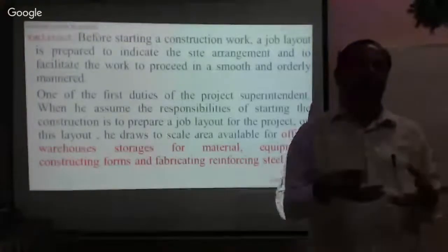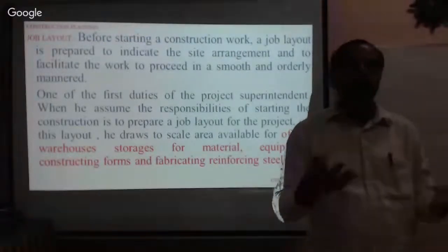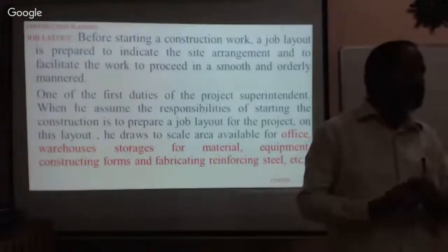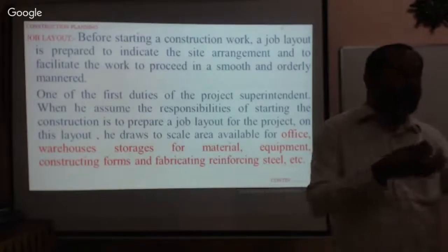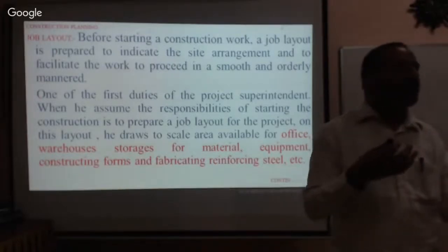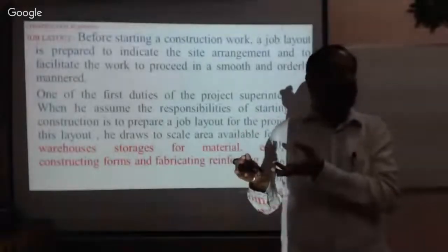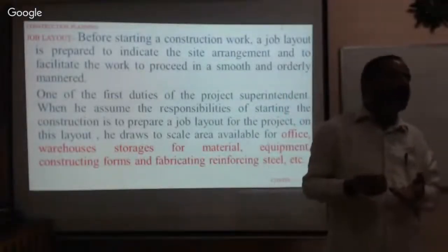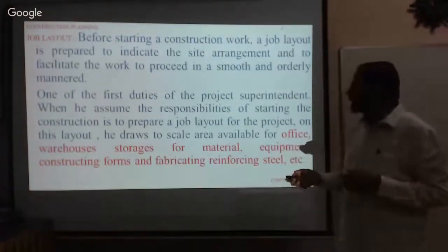The barbender should not be disturbed. The machine operator should not be disturbed, isn't it? The material, no wastage of material. It should be easy to transport, a short distance, isn't it? And the canteen facility, security at the entrance, office at the entrance. I will show a few photographs so you can understand much better.